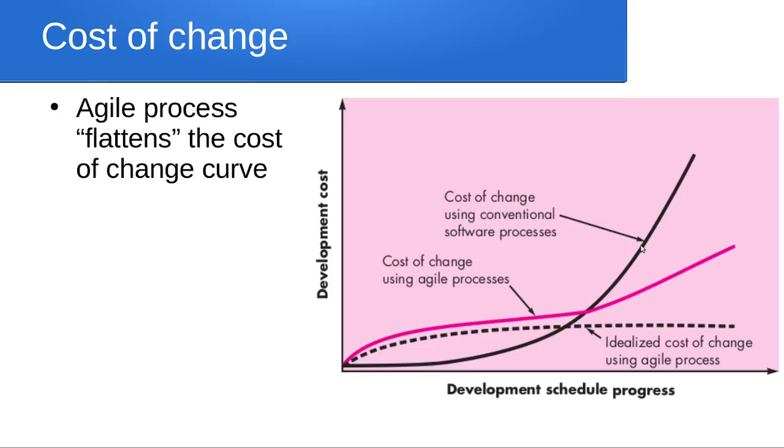So what can these things be? You will have to make some new modification in the existing components, or you need to design new components. Or for these components you will have to perform the tests again. So if these kinds of change requests come in the later stages of the software process model, it will be a very high cost.